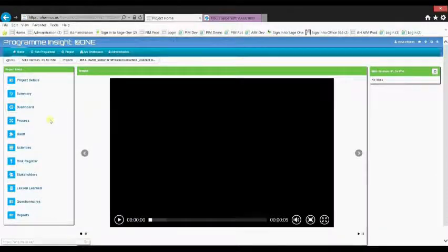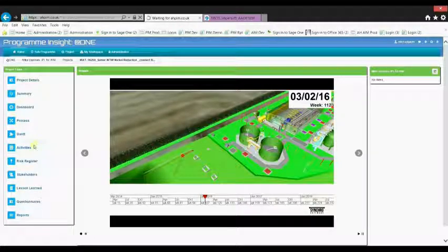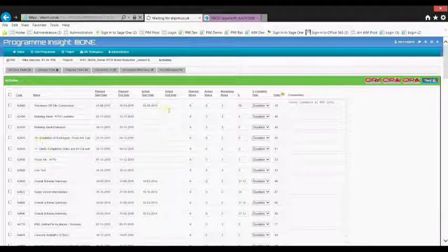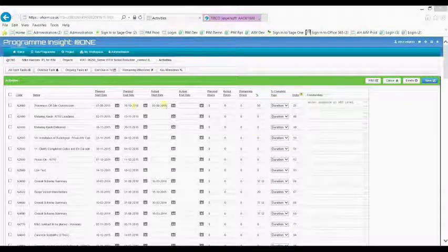We can go to the project and look at the actual activities. So in here we can see that you can enter in comments at WBS level, activity level. We can update the dates, so the plan dates, start dates, actuals, the hours, anything we wish. You know what we can do is we'll save that. That then creates a UDF of the project back into P6 from the project planner to review or accept. So we can accept those changes and push that in the push to planner,